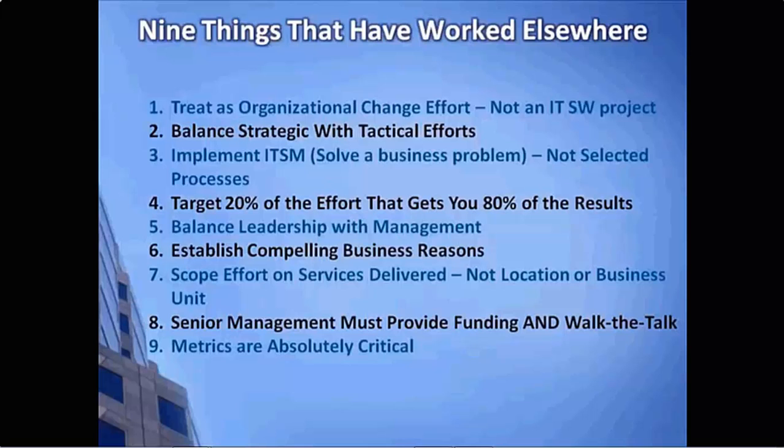Number 7, scope your effort on the services delivered, not the location or business unit. What I mean by this is that if you are in the process of implementing an ITIL process, recognize that your rollout effort, your deployment effort, needs to consider the entire organization. I've been in a number of places where people will say, well, we're going to implement ITIL processes, but we're only going to do it for this data center or that data center, or maybe this business unit or that business unit. The reality is that many times the services that the business actually sees are coming from all your business units or all your data center locations.